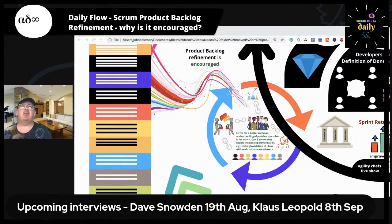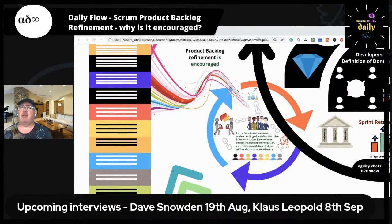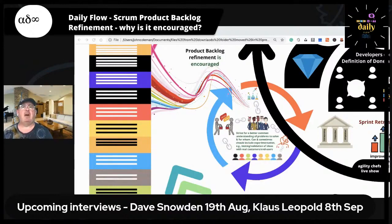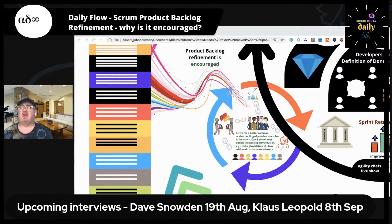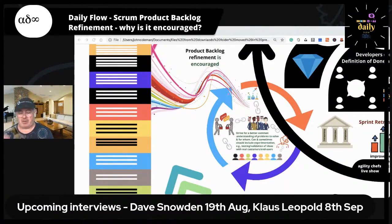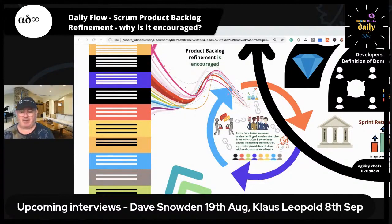How do we attain a common understanding? Typical techniques include splitting product backlog items. I'm a personal fan of example mapping from behaviour-driven development and specification by example, where you list out examples that need to be dealt with. What I love about examples is that even if the team says 'we can't get this done within 30 days,' normally we can say 'we can do this one first example in 30 days.' Can we just do that first example and get some feedback? Because we've got all sorts of assumptions — really hypotheses — that we need to validate to figure out if this is what customers and end users really want.